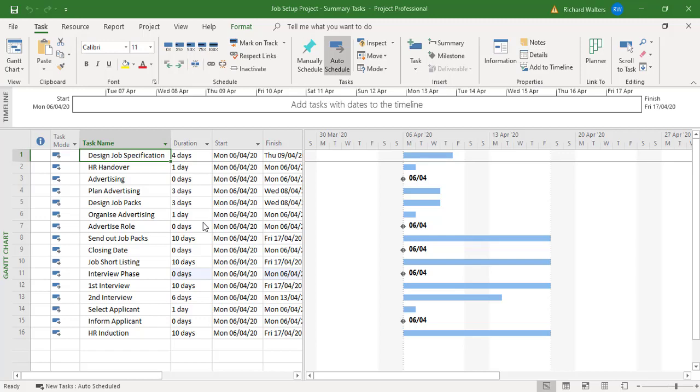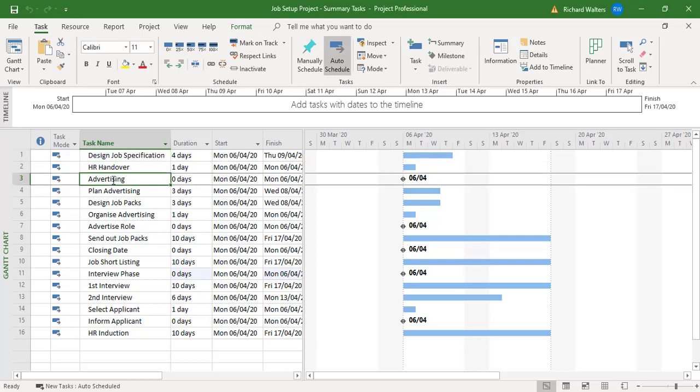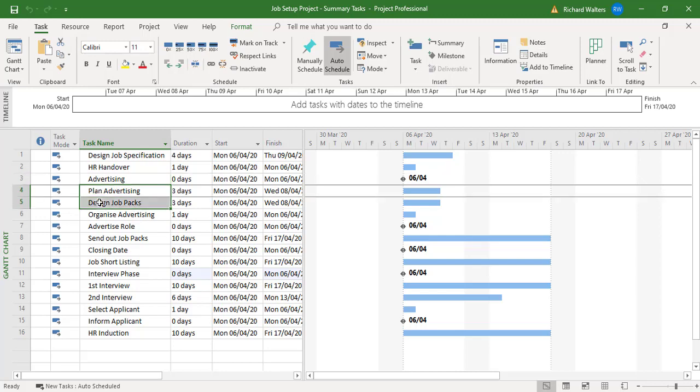In this training video we are going to cover summary tasks in Microsoft Project. In this example, we want advertising to be a summary task to cover plan advertising, design job packs, and organize advertising.